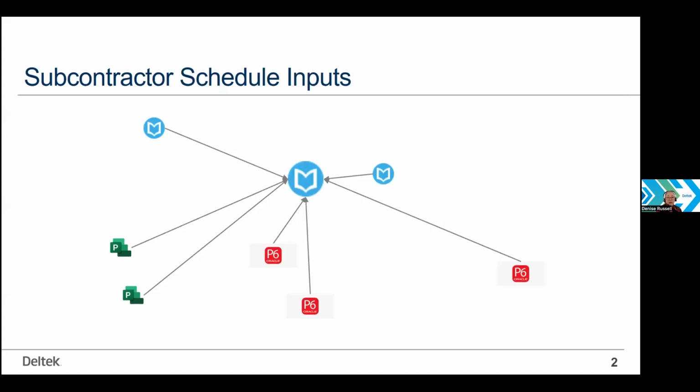The schedule that you receive from any of those could be varying levels. So you might have an entire project that you're going to incorporate into an overarching program. It might be a large scope of work that you've subcontracted out or partnered up with somebody else to do, and that you need to then bring that information back in to align with your project deliverables. And I've even seen where it can be a very small but very important component, where if you receive that tiny little piece late, your entire schedule's at risk. So you want to be able to have that detail and the relationships to reflect that criticality in your IMS.